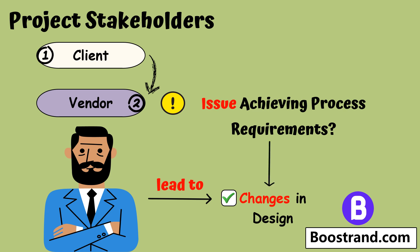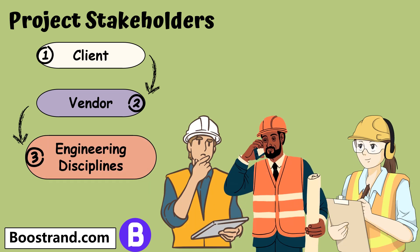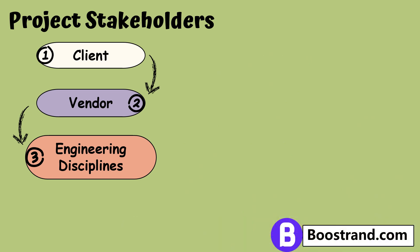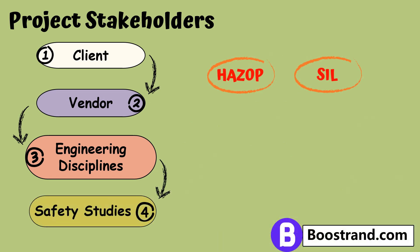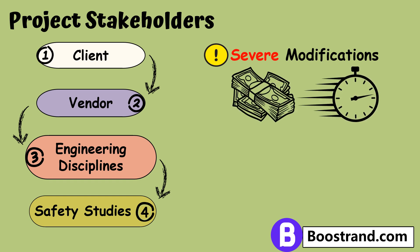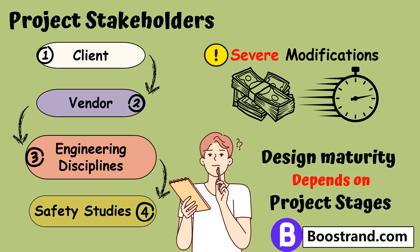This may lead to a modification of the design. Engineering issues related to piping or civil works may arise even within the engineering company, leading to looking for alternative solutions. Safety studies such as HAZOP or SIL may impose more requirements to ensure that the design has enough protection for the plant. Each phase represents a level of accuracy in the design, which is important to avoid severe modifications and their consequences related to cost and delay in delivery.